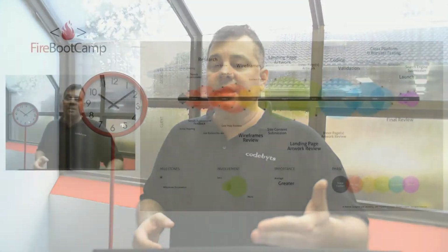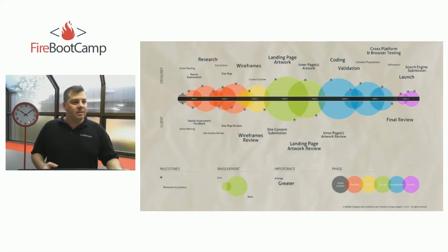And then, for example, how do you decide what to take off? Do they weigh the same way? If you take off something that's going to take you 3 days to do, but you're introducing something that's going to take 6 days to do, you're actually really disturbing your workflow and your timeline. You're now in danger of not delivering this. And the client is not going to care because you accepted it, and he's going to blame you all the same. He's going to say, hold on, you promised me. Oh, you guys are not that good. So you're risking these.